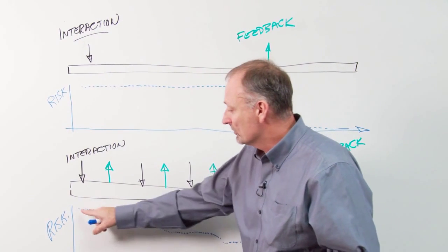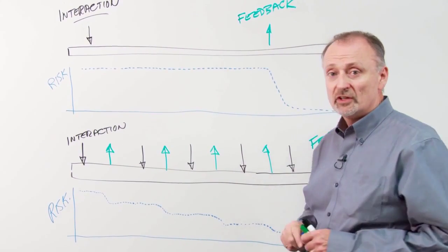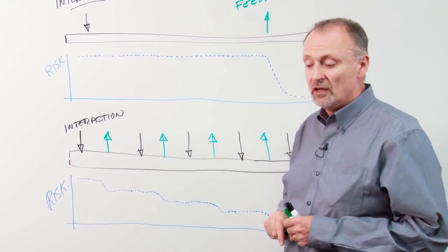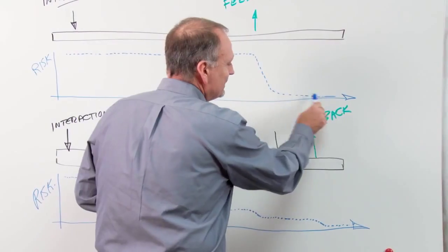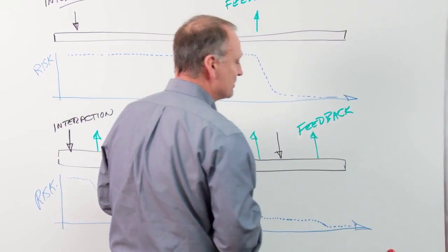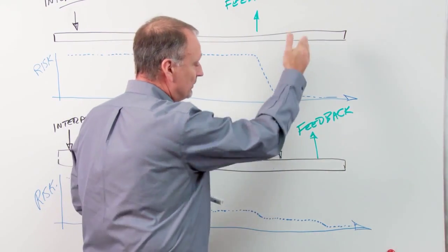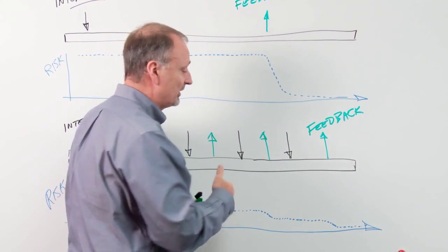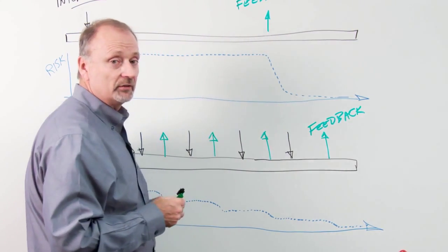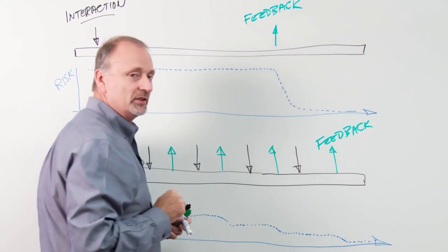The result is we have a risk curve that goes down in steps, incrementally over time, converging, like a burn down almost of risk, on a product that's deliverable. When we deliver the product with the risk at low, it's just how did we come out of this journey and what was the journey like? So we can deliver a product in both instances. Some would argue with Agile we're going to get a much higher quality product because we're able to bring that risk curve down on a gradual basis, as opposed to the big bang approach that you see in Waterfall.